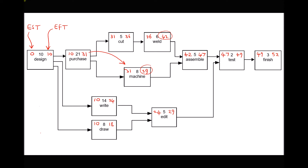Providing all tasks start at the earliest possible time, this project can be completed in 52 days. What we've just done is called a forward pass — going through the process from start to finish. We're now going to do something called a backward pass. The purpose of the backward pass is to identify any slack in these activities, since some activities can start later than the earliest start time without affecting the overall schedule.